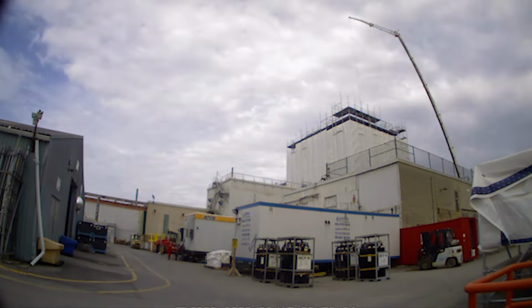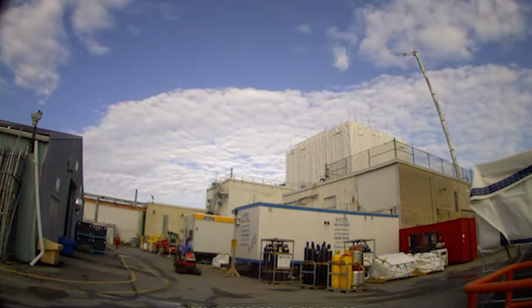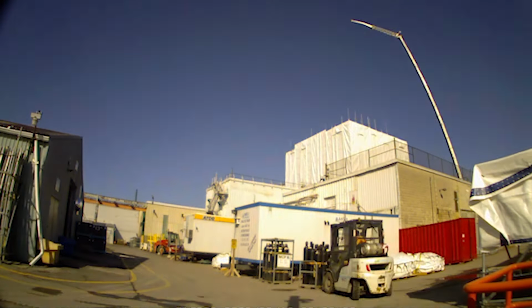Cameco had developed internally engineering procedures as far as air quality in the building. There were, I think, 58 negative air machines set up in a huge ventilation system. All of our workers were in full-face respirators or half-face respirators while they worked there, in Tyvek.